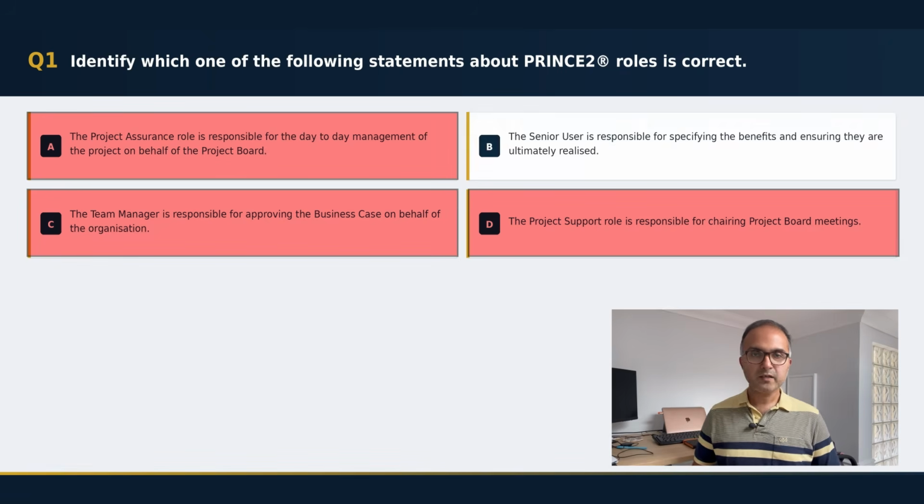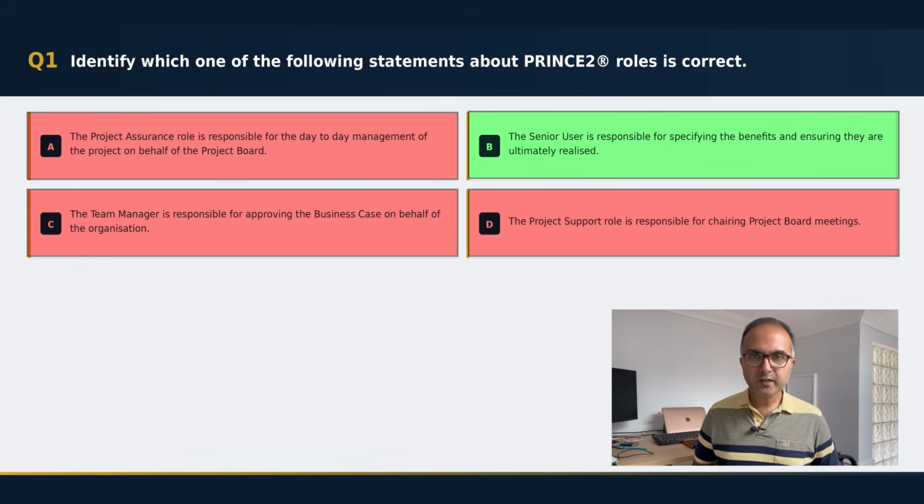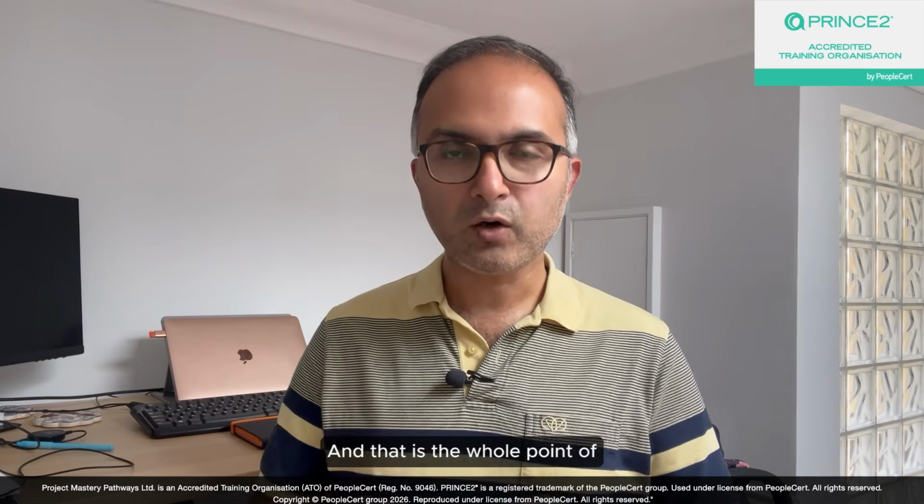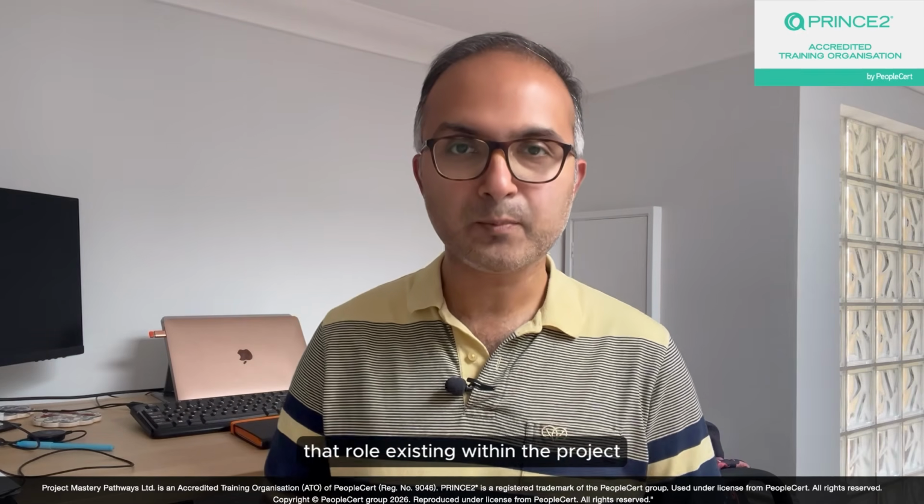So the correct answer here is option B. The senior user specifies the benefits and is accountable for ensuring that they are realized. And that is the whole point of that role existing within the project board.